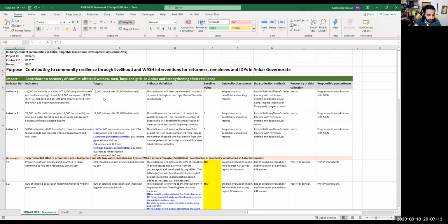If you are not a good program manager or project manager, sometimes you fall into this one. For example, you hear from your staff the need is 20,000. You hear from the media it is 30,000. So you go for 35,000, thinking, I will bring more. People who bring more fall down and do not continue their work, because when you plan or design a project, you should be accurate in your information. When you have 12,000 people, you bring funds and aid for 12,000 people. But if you say you have 30,000 people and you find out it is only 12,000, you will have a lot of budget remaining and they will accuse you of bad planning.